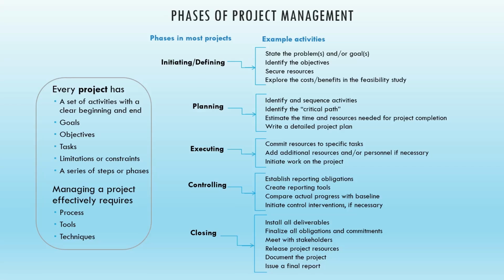Another report is called the resource allocation report. This report identifies the various resources. Resources means human resources, tools or equipment, and other items related to the project. So how many resources are being used in specific project activities? What is the current position of use? What are the unused resources and how many additional resources are available? All this information can be obtained in the resource allocation report.